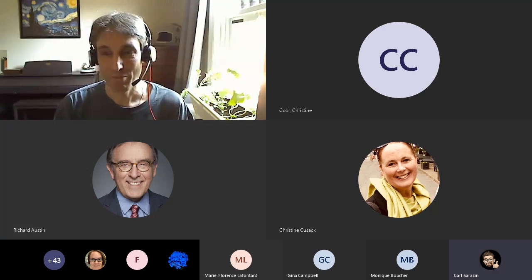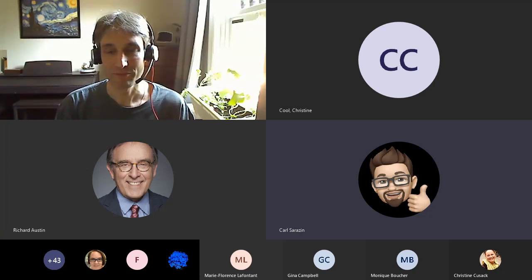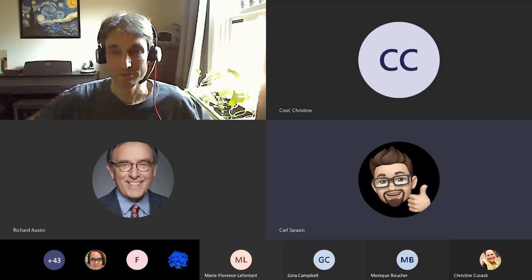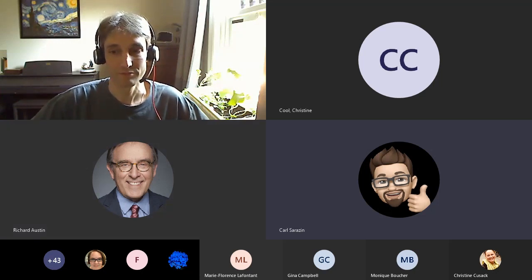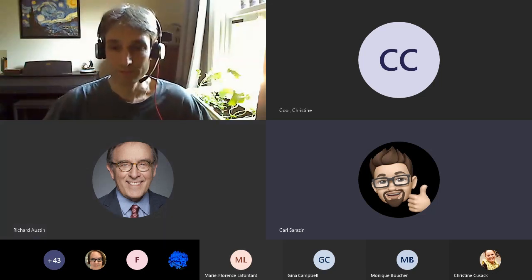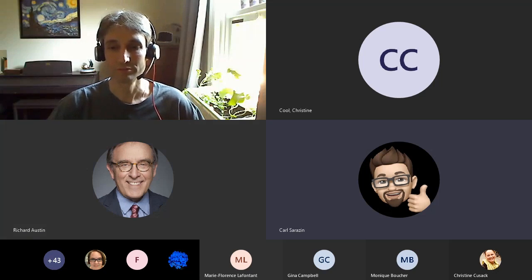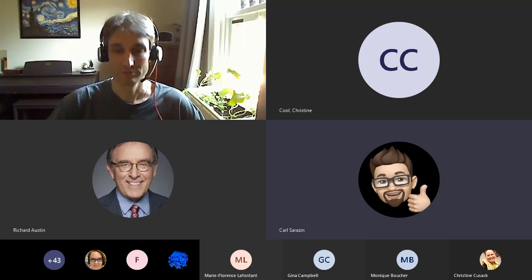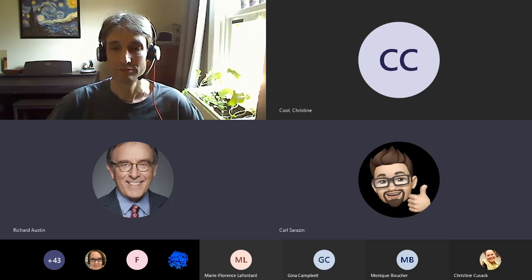I think what people need to understand, mostly, Jarno, is that you need to be part of a team inside Teams in order to create your plan and put it in there. So whatever access you give to people in your team, those are the people you'll be able to give tasks to in your planner. For instance, I created a little project. I sent my ticket to the help desk, they had this created for me, and now whenever I want to plan something in there, for instance if I wanted to add somebody from UGME or PGME at the faculty, they would need to be part of my team before I can assign them a task.